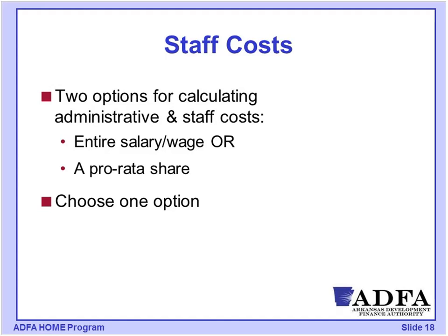So you would need to have a timesheet that would show the hours that were worked, and then within those hours be able to break that out across the different funding sources and be able to charge that off. So for instance, if I was working, let's say, with both CDBG and HOME funds, I would be reporting on a daily basis on my time and activities report.